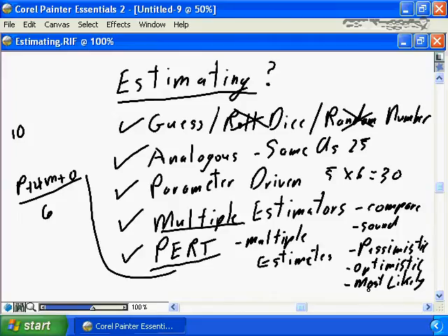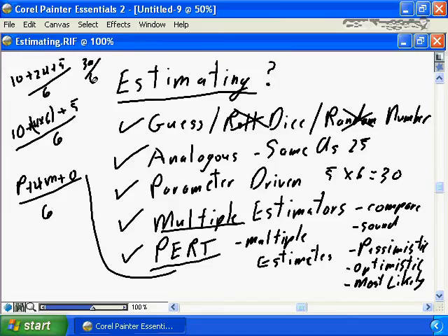If this were an average project and everything went reasonably well, it would probably take me 6 hours, so it's 4 times 6. And if this were the perfect project, if I had absolutely no challenges, I could complete this in 5 hours. So you do that over 6. So it's 10 plus 24 plus 5 over 6, or 39 over 6.